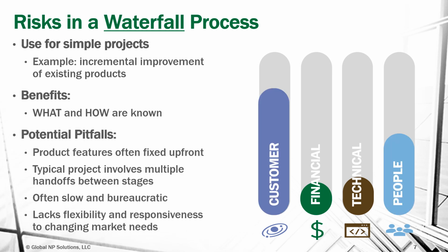And we also can recognize some potential pitfalls. In this case, product features are often fixed up front in a waterfall or predictive or staged and gate process. And that gives us some risk of the customer. Customers might change during the development period, especially if it takes a long time between ideation and commercialization.